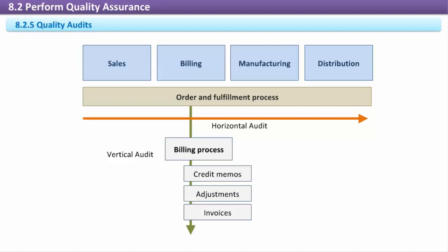If it helps, we can think of quality audits as having a similar purpose to financial or accounting audits. Both are independent reviews to determine whether appropriate controls, policies, processes, and procedures are being followed. Quality audits are best performed by people from outside the project. Audits can result in recommended improvements to bring the project in better compliance with quality policies. For organizations with a quality management system, the audit also determines the effectiveness of the QMS.